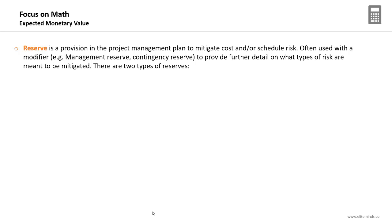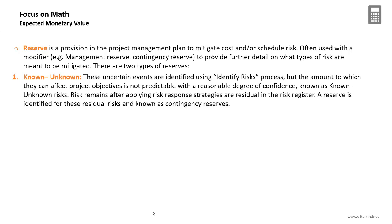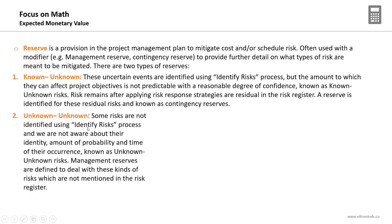The most important application of EMV is reserves calculation. A reserve is a provision in the project management plan to mitigate cost and/or schedule risk. There are two types: contingency reserves, used for 'known unknowns' — risks that were identified — and management reserves, used for 'unknown unknowns.' Known unknowns are uncertain events identified through the identify risks process, and their contingency reserves cover the residual risks remaining after applying risk response strategies.